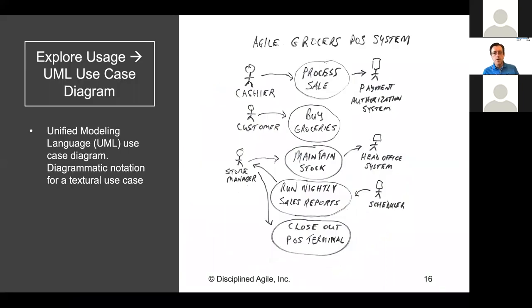Another one, not a default choice, but one that I've used for many years, is a use case diagram. You can hammer out a use case diagram in 15 or 20 minutes. It's not a big deal. But here's where I want to talk about the weaknesses of user stories: they lack context. If you're brainstorming user stories, what we have seen happen many, many times is that because it's unstructured, we end up having pockets of a lack of requirements coverage. We miss entire epics, or stories within the epics, because our minds are random. Without some structured thinking and organization of the stories, this is a real danger.